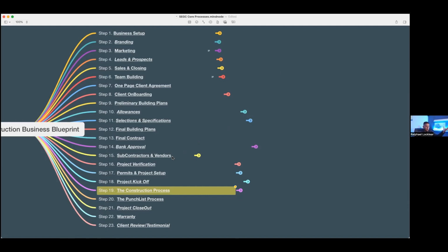That's normally your number one issue. But if it isn't the communication, it's going to be having order, making all your selections up front. Everything's documented. There's no questions. What type of tile? We're using this type of tile. What type of grout? You've got the grout. What grout color? You've got the grout color. What grout spacing? You've got the spacing on your grout. What floor pattern? You've got that listed, right?